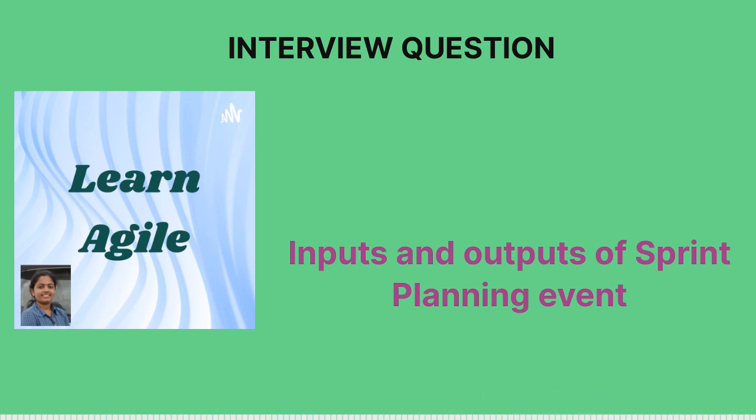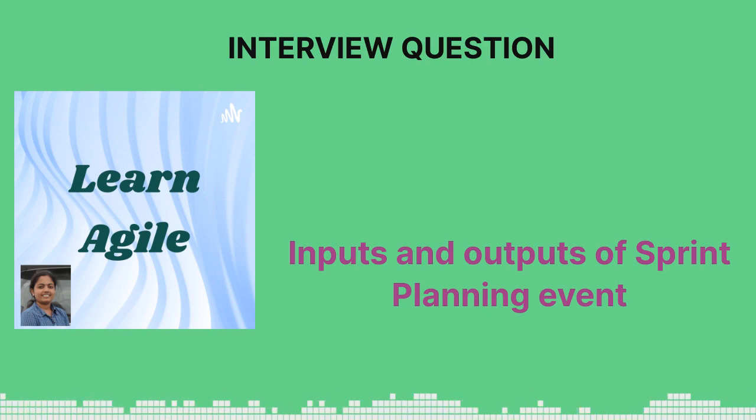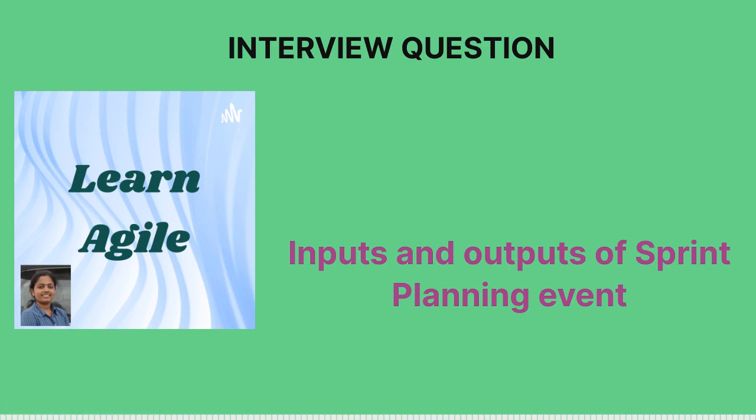So we talked about the outputs. Now let's go back to the input. As I mentioned about priority, now you are all aware priority is one key thing. And yes, you are aware of the second key thing I talked about, pulling the product backlog items. So product backlog work items is the second input. Priority is the first input. Can we club this? Yes, we can club. What we can say? Prioritized and DOR met product backlog work items is one of the inputs.